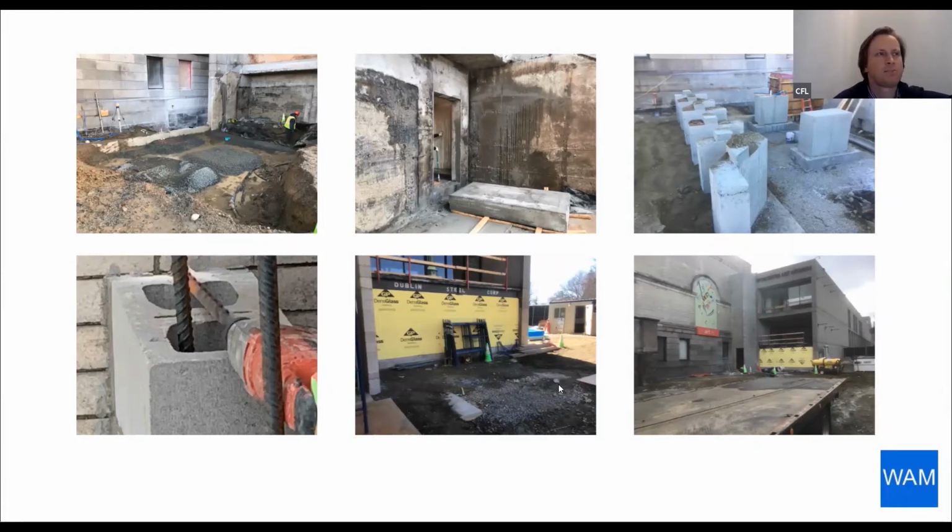And when we picked things back up about August 1st, material prices had begun to escalate. So a lot of our initial work in jumpstarting the project in August and into September, and actually as of the middle of July and into August, was looking at the numbers and working on matching the vision with the budget. So we saw yet another couple of months of delay to that.